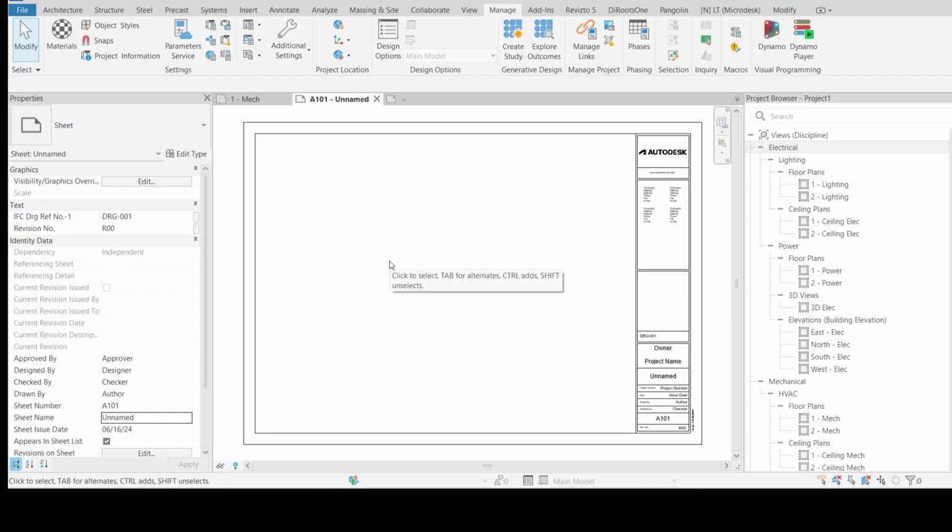So for example, you have 150 drawings for your project for 3 services, let's say. You are responsible to deliver the 3 services. Each service has 50 drawings and in total you have 150 drawings. So what you have to do is create the sheet, create the views and put them on the sheet, then put all the required parameters and fill in all the information, and then try to print it all in PDF and CAD formats.